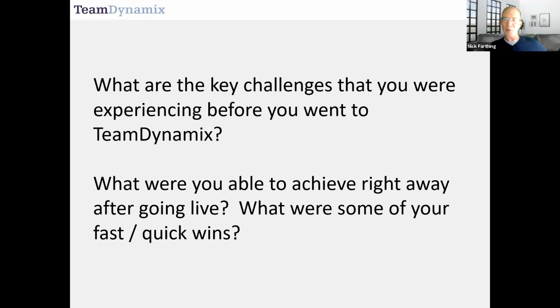Actually, right now, we have a process in place. You spoke to workflows earlier. Each vice president of every department in Raymore and Flanagan right now reviews and approves every service request that is generated from their department before it gets to IT. Let me say that again. The vice presidents of our largest departments in this company have a dashboard. They look at every service request that their associates submit to us. They review it and approve it before we get it to work on it, because those vice presidents now understand that we have finite capacity. And if they send us waste, it is going to take away from their capacity that delivers them value to move their business forward. And that's been a great partnership.